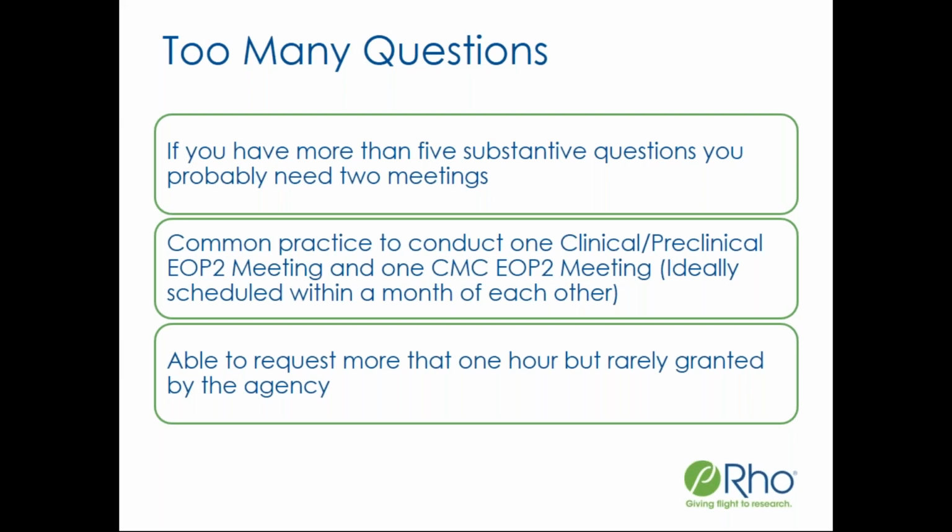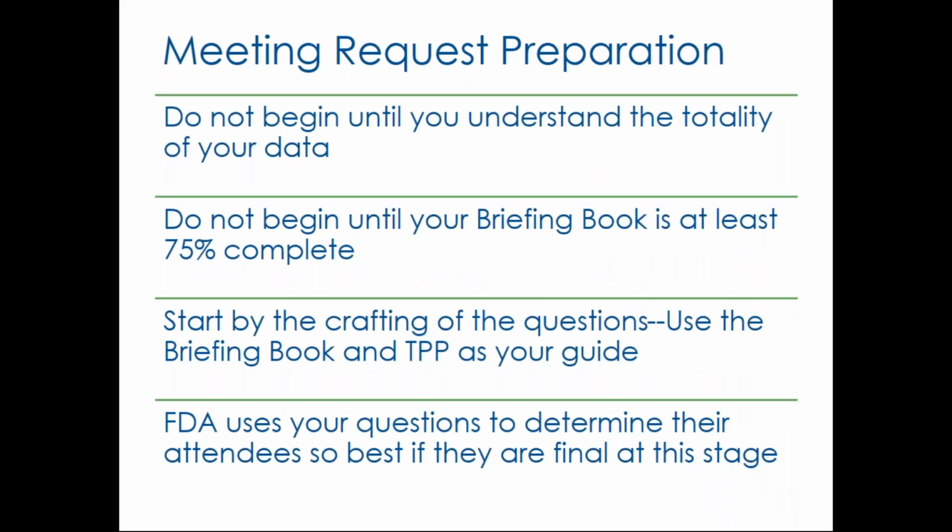FDA actually recommends this strongly. So if it looks like you can't cover everything in a single 60-minute meeting based on your development program and the considerations you have for discussion with FDA, we would recommend asking for 2 separate meetings. And you can do the CMC meeting as well as the clinical meeting in close proximity with one another, ideally within about a month or 2.